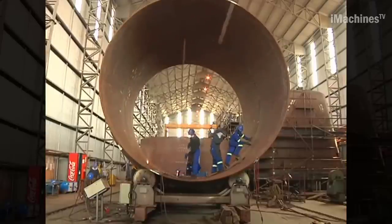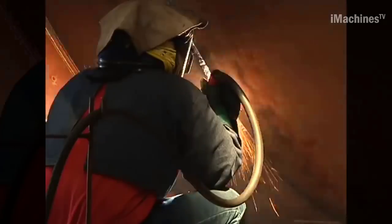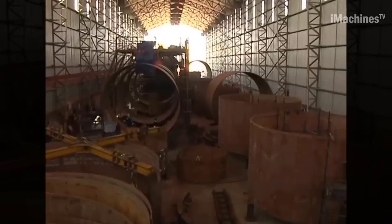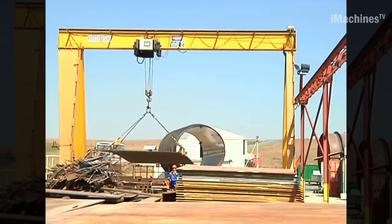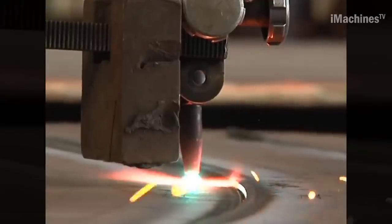Road construction started in January 2007 and was completed in June 2009, including the construction of a pass to the top of the escarpment. Simultaneously, work on the two dams, Bedford and Bromberg, progressed alongside the tunnel and turbine infrastructure. Both dams were completed and commissioned ahead of the tunnel construction.